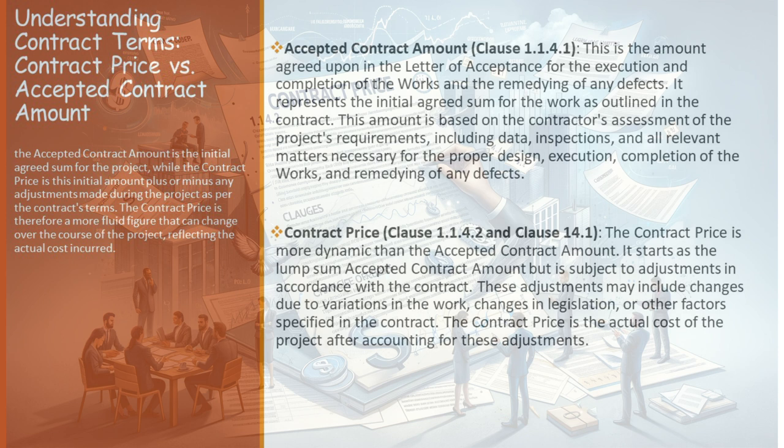In summary, while the accepted contract amount and the contract price may seem similar at first glance, they serve different purposes in a contract. The accepted contract amount is the initial agreed sum, based on a comprehensive assessment of the project's needs. The contract price, on the other hand, is a more fluid figure, reflecting the actual cost of the project as it evolves.